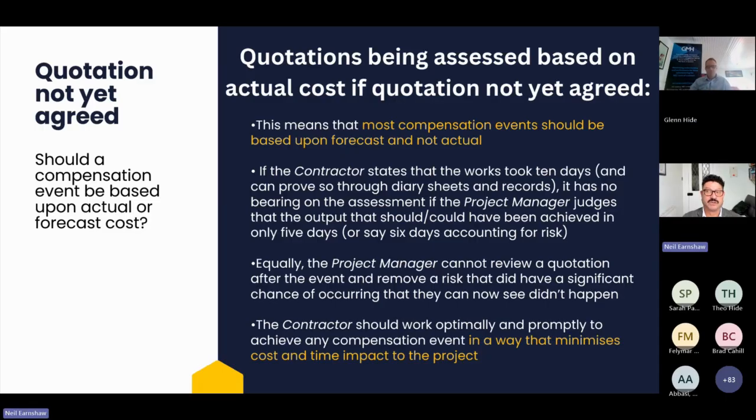Mm-hmm. Absolutely, great point, Glenn. That case very much turned on the specific facts of the case, and the main ones being neither party had complied with the contract, and they'd ended up in a mess. And then the judge, because they'd been through adjudication before that, ended up in front of a court. The judge has to award damages. How on earth are they going to do it? But please don't think that is now a contractual shortcut that we should be applying. It absolutely isn't. We should try and stick to the contract as closely as possible.